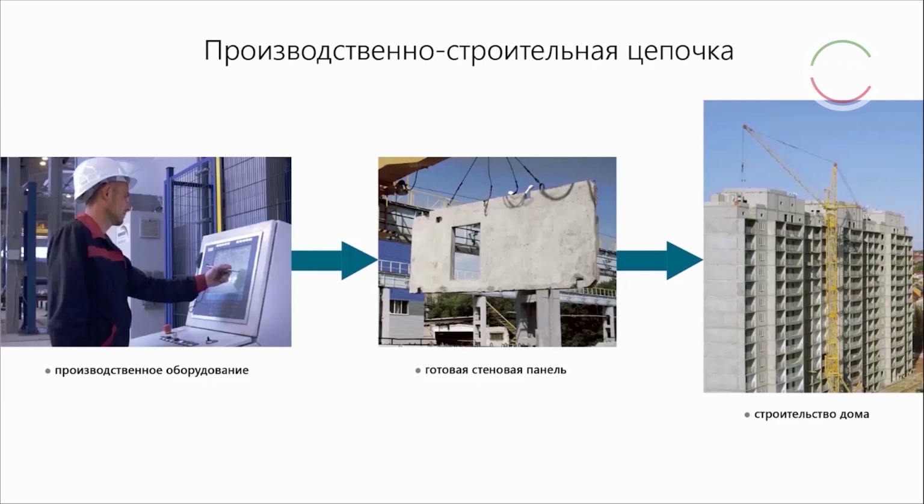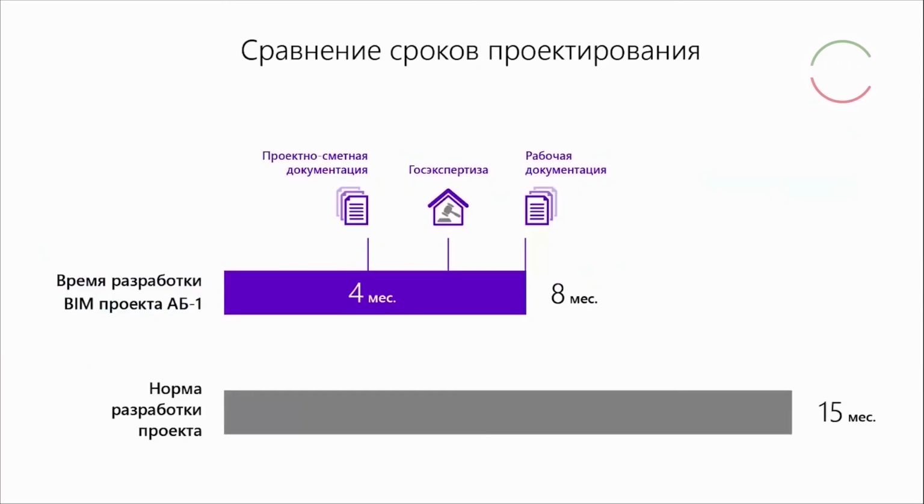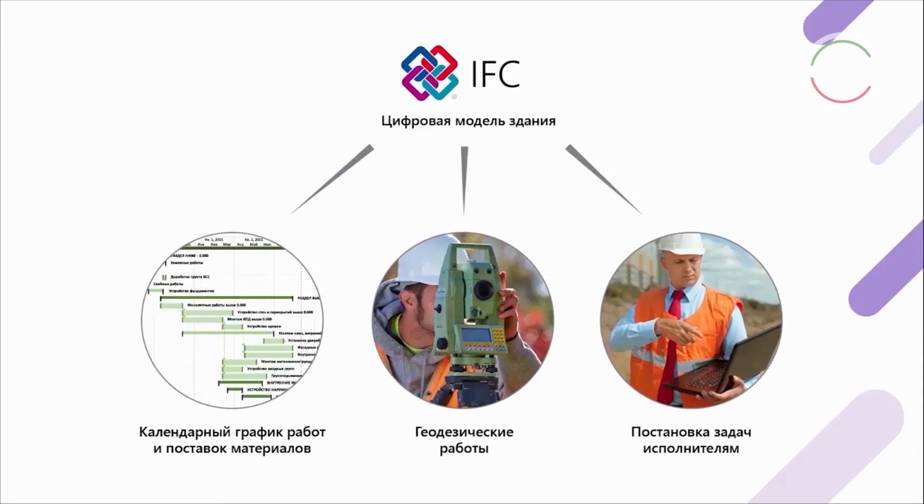Even now, the factory is producing the products, walls, intersections for the houses and blocks of flats of Salvat Kupere residential complex that will allow high quality of all works on erecting the houses for the residents in the future. The advantage of using BIM is the overall saving of time on development of all the documentation, and using this information model, all the works were done in an 8 months period, and the cost of that project didn't go up.